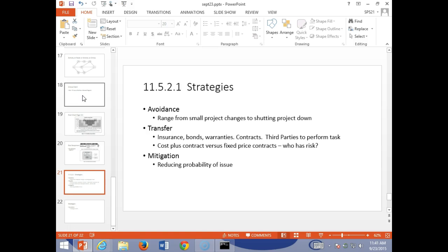If it doesn't meet specifications, so the road falls apart before it's ever built, or they don't meet a time specification in a lot of cases, Peru then would have the ability to remove that contractor and pay for that job being done from that performance bond. Now, if a construction company has that happen several times, are they going to be able to get a bond? No. But it's a way to ensure that that job gets done, so we transfer risk.